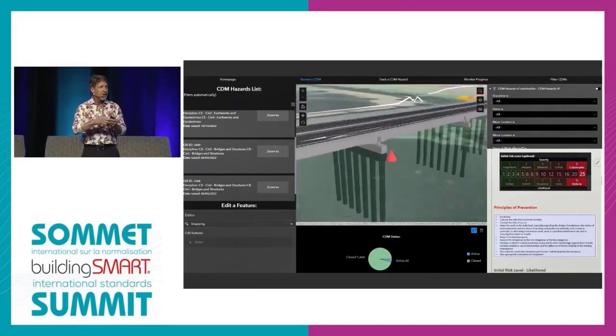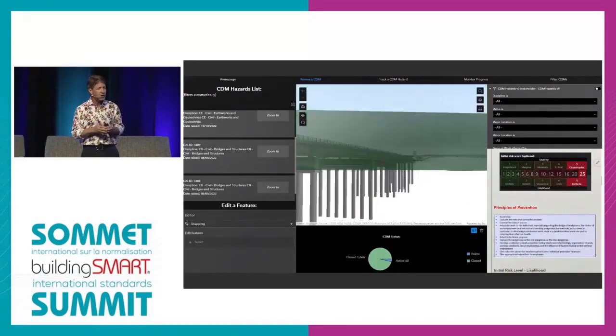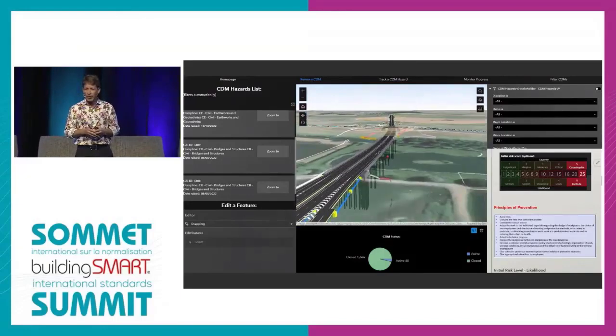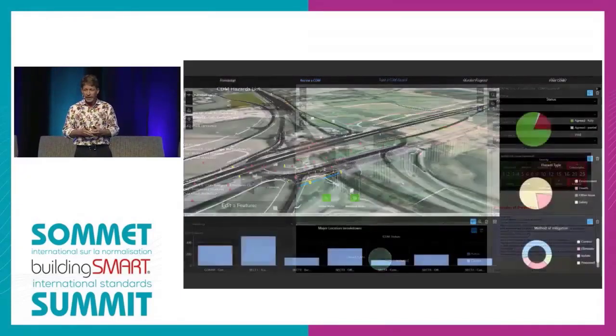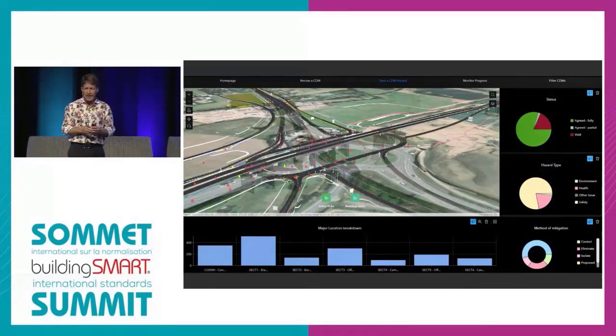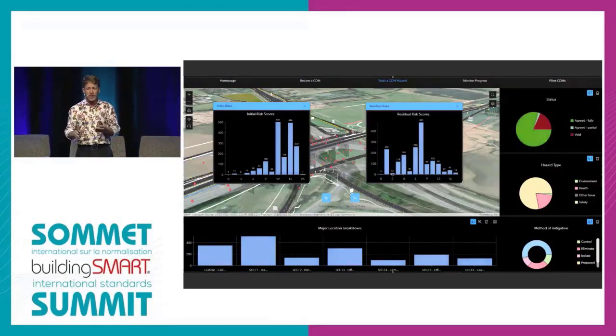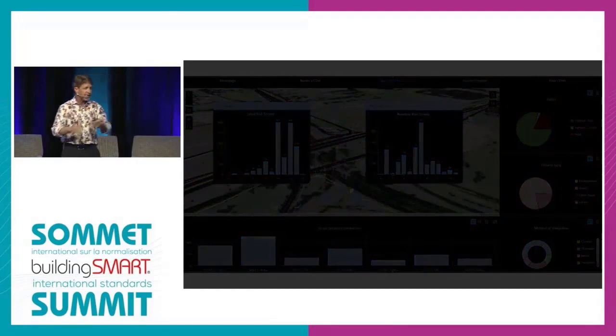And what they've been able to do is catalog all of the situations that they need to be aware of so that construction safety can be considered more easily. And you'll see that what started out with a rather large number of conditions that they needed to consider at the beginning were addressed and reduced, and actually the schedule estimated to be 25 months was brought down to 17 months.